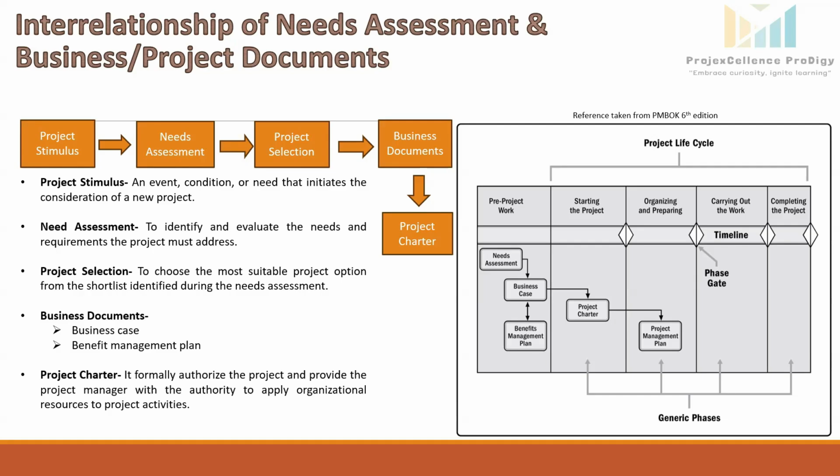It will contain the expected benefits like reduced energy cost, compliance with environmental regulations, and the timeline for realizing benefits, including milestones like when the installation will be completed, commissioning, and when the operational phase will start. And it will contain the benefit metrics, like the energy output, the cost saving, and the reduction in carbon emissions.